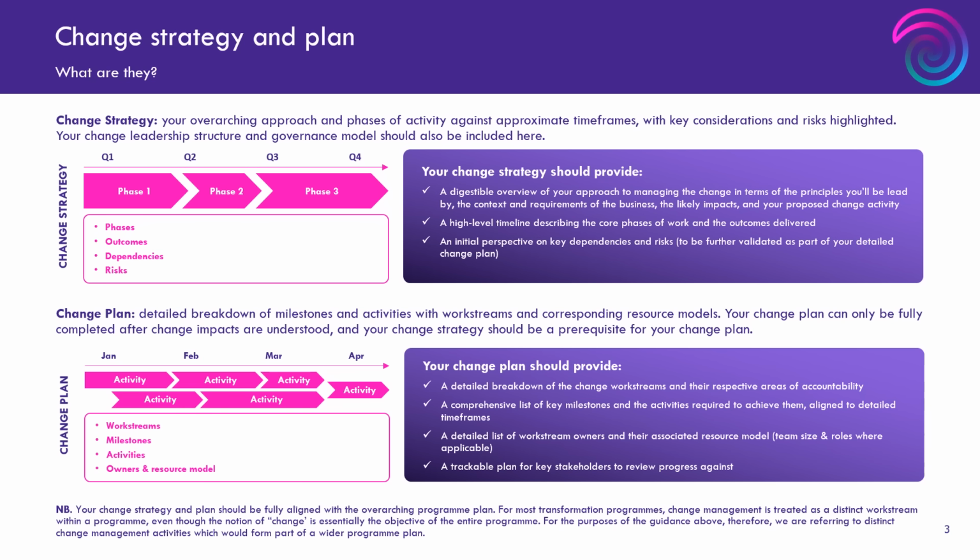The key thing to call out is, for most change initiatives, you shouldn't really be able to write your change plan in detail, so you can scope some of it out but not the detail, until you've done your change impact assessment. And have a look at the other episode we have that focuses on how you do a change impact assessment, because it's that impact assessment that ultimately helps you understand in the real weeds what you're going to be changing, what you need to do, which different parts of the business and populations are impacted, and what your change response is going to be to manage them through the change.